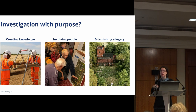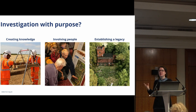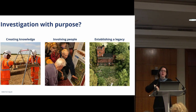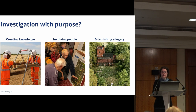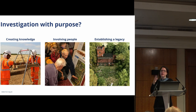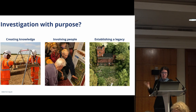Leaving an improved legacy of skills and understanding — the next project will be better because you've trained people. A lot of lean is about changing mindsets and changing how people think about what they're doing. Tidy sites is a big thing in lean — have you got one person responsible for putting your tools away at the end of the day, or do they just end up in a pile in the cabin? It sounds silly and simple, but these are the things people are applying on big construction sites to cut down time lost and make the most of their resources, so everyone has what they need when they need it.